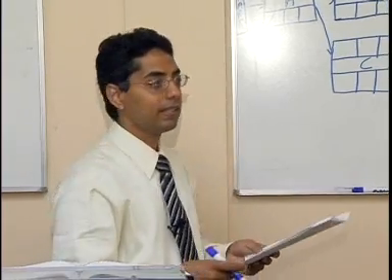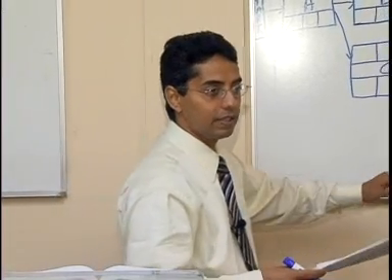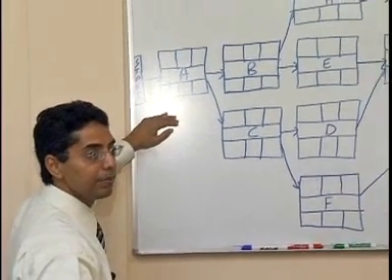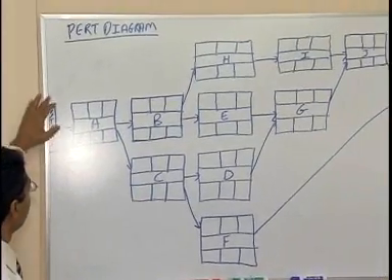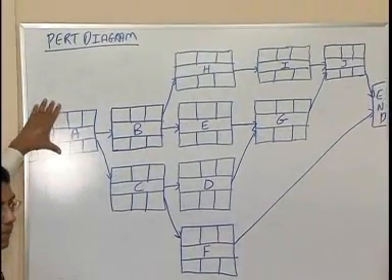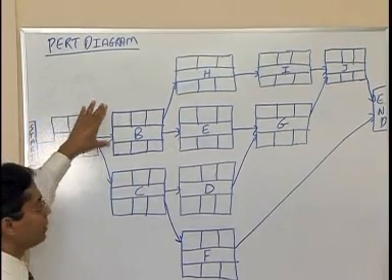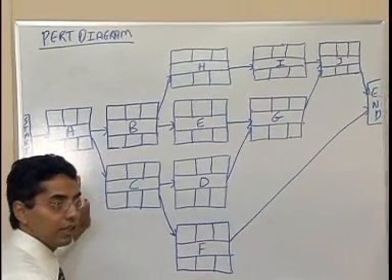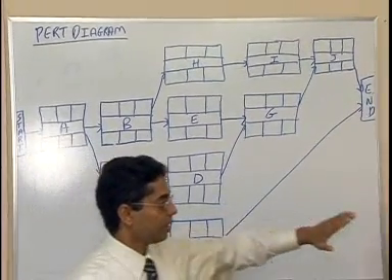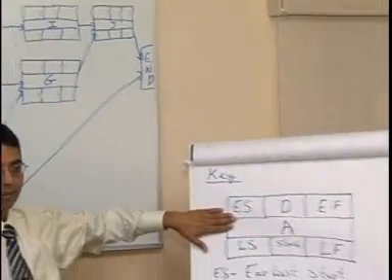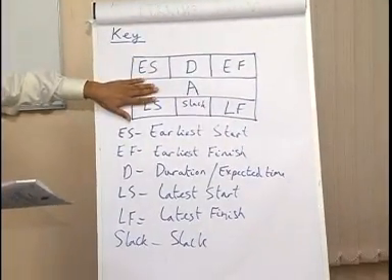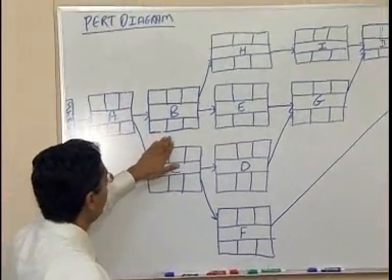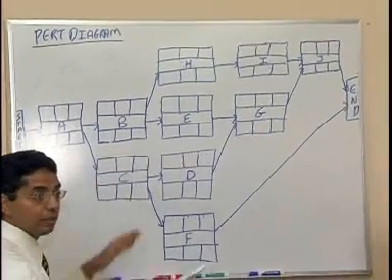Okay, now the next step is, after you have drawn your sketch, we have to draw the PERT diagram. The PERT diagram is based on your sketch. From start, we had A, then from A, the predecessor for B was A, predecessor for C was A. So it's pretty much the sketch now. Instead of circles now, you're drawing this diagram. You're drawing this box but empty, and you superimpose it here. So we have A going to B as based on how we did the sketch.